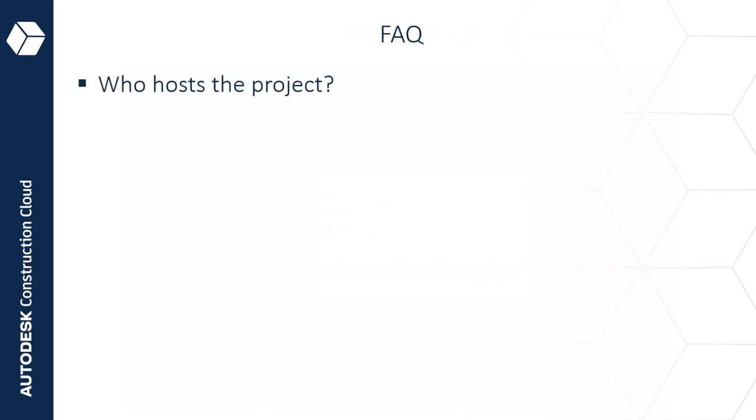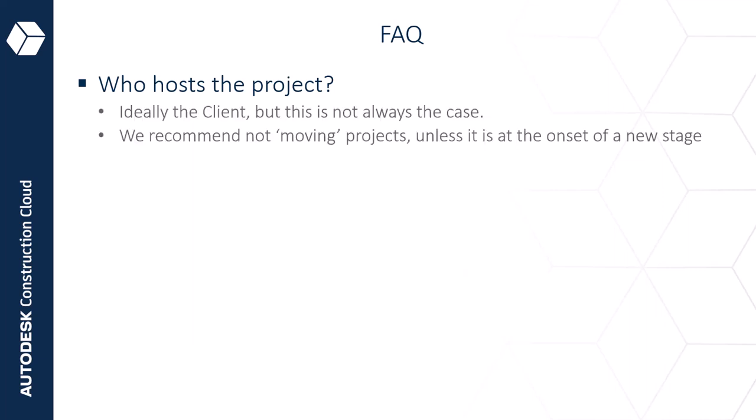A couple of general frequently asked questions. This one that's always top of mind is: who hosts the project? Well, ideally the client, because ultimately it's their project and it's information that pertains to the management of the facility after construction, but we know that this is not always the case. Often it's the principal agent, the developer, or one of the consultants who were just the first to raise their hand and said, okay guys, we'll host it.